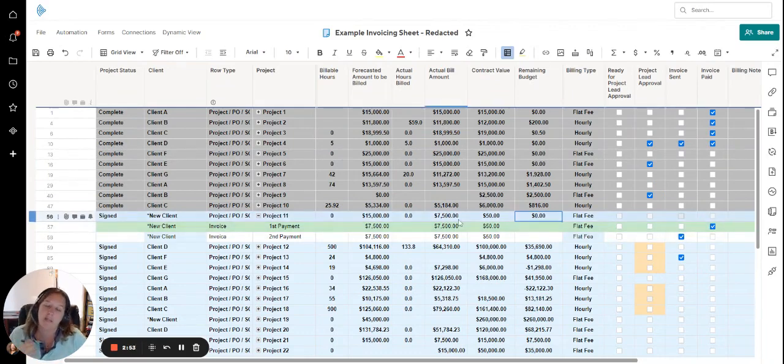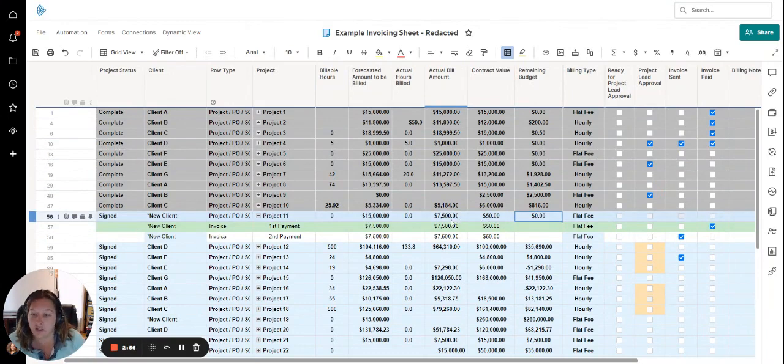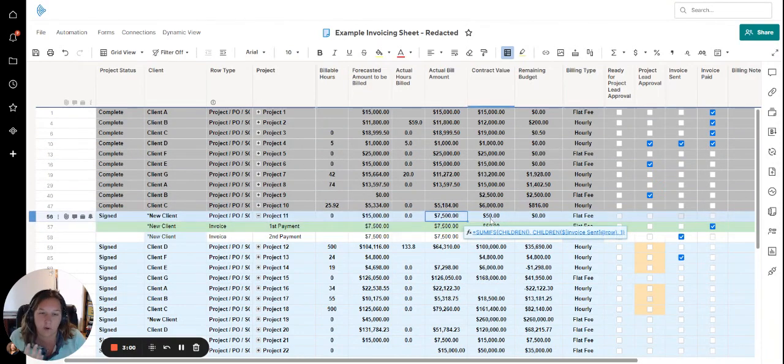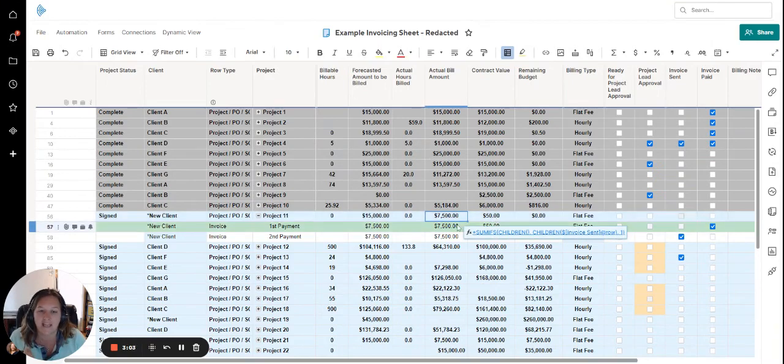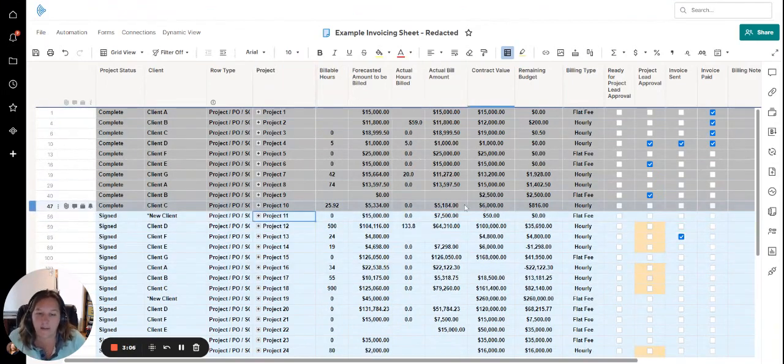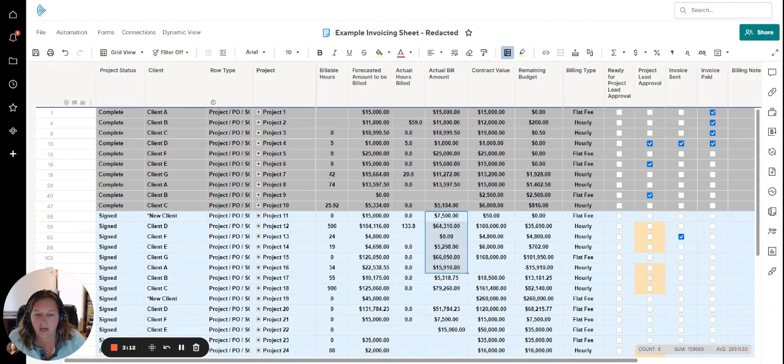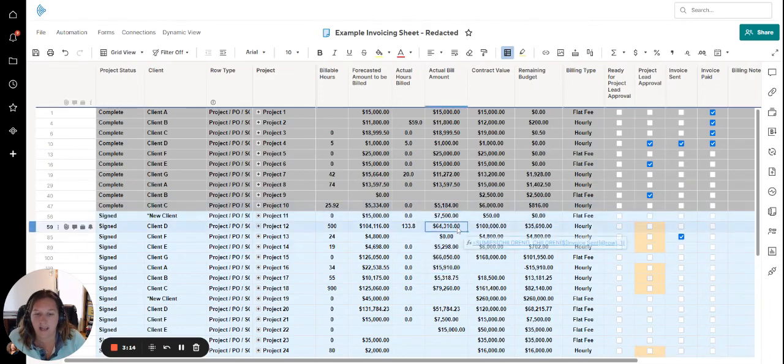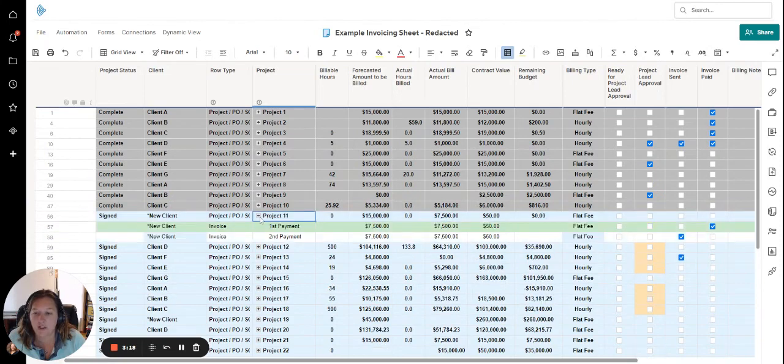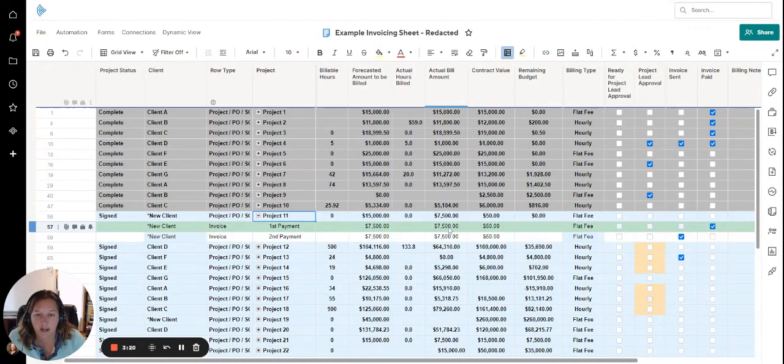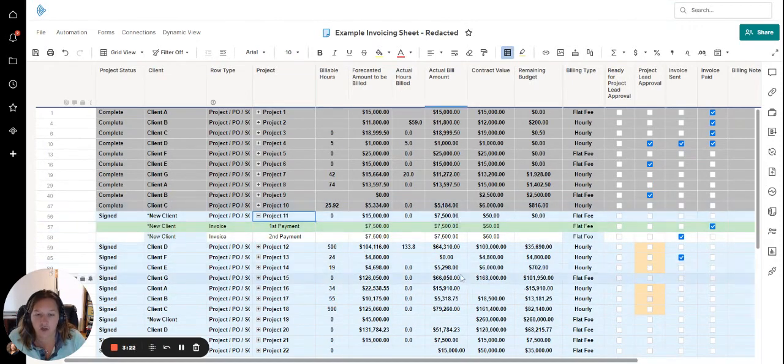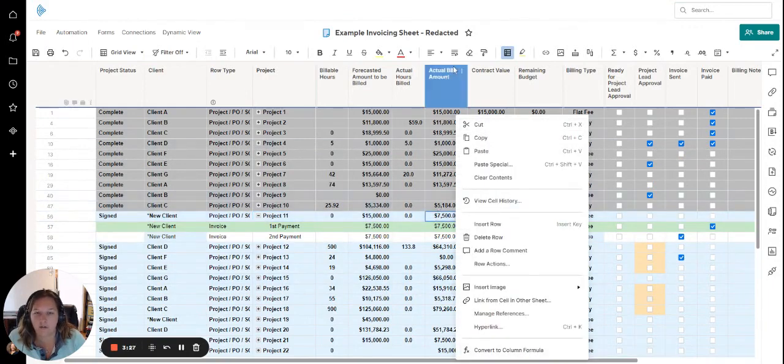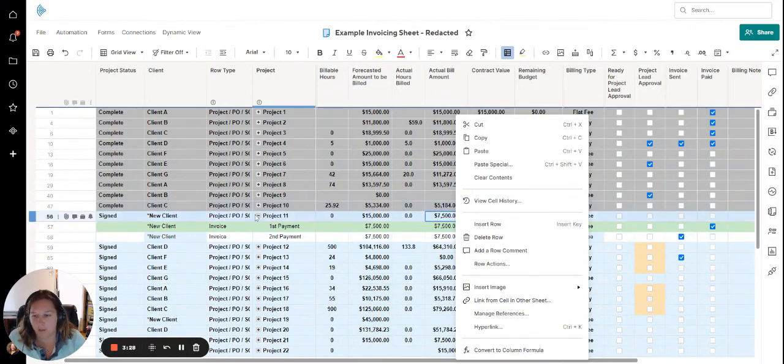The other piece here is just a quick tip. If I wanted this formula to only show up in the parent columns, I'm going to go ahead and drag and drop this down, and it's going to only do the parent. So if I go here, I'm still seeing the actual data. If I had dragged and dropped this all the way down or created it as a column formula instead, it would have overwritten all of the child components.